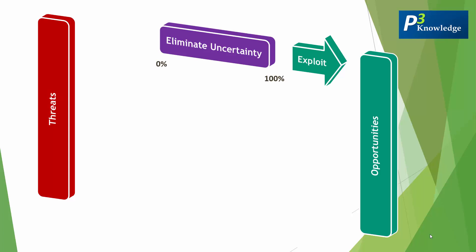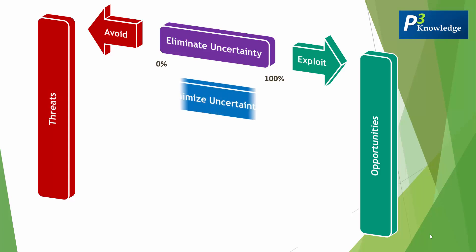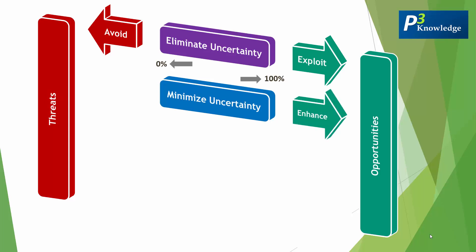And when we're trying to make a threat 0%, it's called avoid. The second principle is to minimize the uncertainty — trying to make the uncertainty closer to being a certainty by driving the probability toward 100% or toward 0%, but not reaching either. In the case of opportunities, it's called enhance, and in the case of threats, it's called mitigate.